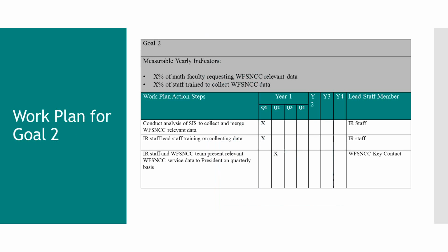So again, the work plan. You want to show progression of the expansion and movement to scale, noting milestones and yearly indicators, and then clearly designating specific staff. And I'm sorry, I should have gone over that in more detail when we were talking about Goal 1. But you can read the description in 2F, and again, that description repeats itself throughout the implementation plan.